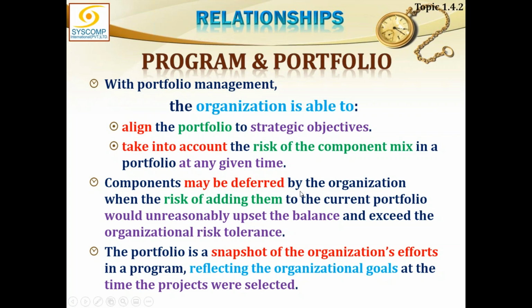Components may be deferred by the organization when the risk of adding them to the current portfolio would unreasonably upset the balance and exceed the organizational risk tolerance. If you feel that any more projects added to the portfolio may increase the risk and upset the balance of the organization, we will not add more projects. This is the portfolio design.